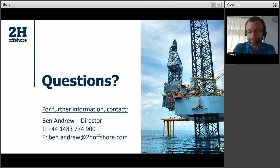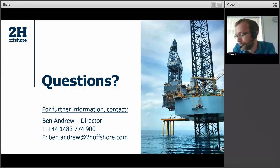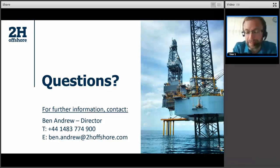Let's see. The first question: what would the turnaround time be for a brand new tripod CSP system? So we frequently deliver in less than 9 months, but that 9 months is normally driven by conductor delivery, which can be 7 months plus, maybe for 36-inch conductors with fatigue premium connectors. That depends on the current market. Sometimes you can get them quicker, and sometimes they may be in stock, and sometimes 30-inch may work, which can be done much quicker. And the second thing it's constrained by is equipment delivery, for which the lead time can be of that order. If all one's talking about is delivering a small tripod platform or retrofit system in relatively shallow water with limited equipment manifest, then 4 months is achievable. So that's a pretty wide range of durations, but it's really driven by the connector supply and the facilities supply.